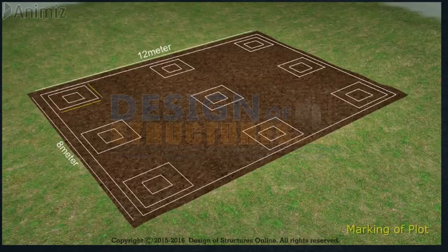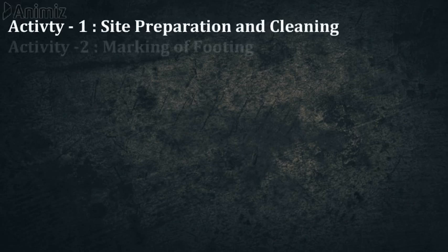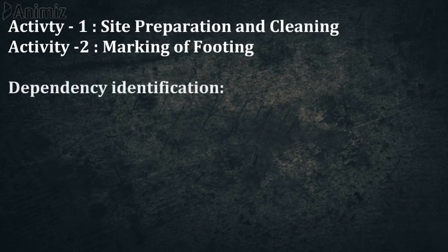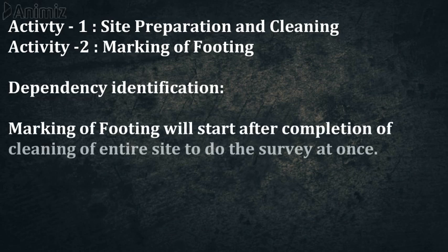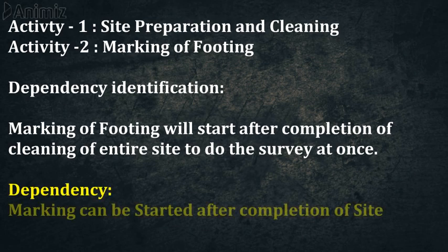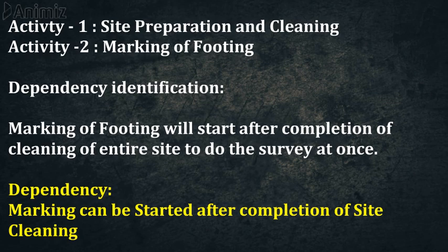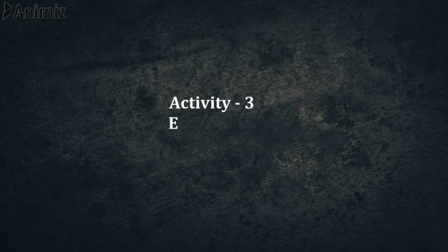Now marking of plot should be done as per drawings. We have seen the second activity. Now the second activity, which is the marking of footing, we need to think about how this activity is dependent upon the first activity. So marking of footing will start after the completion of cleaning. So we can say that marking can be started once the site cleaning is completed.